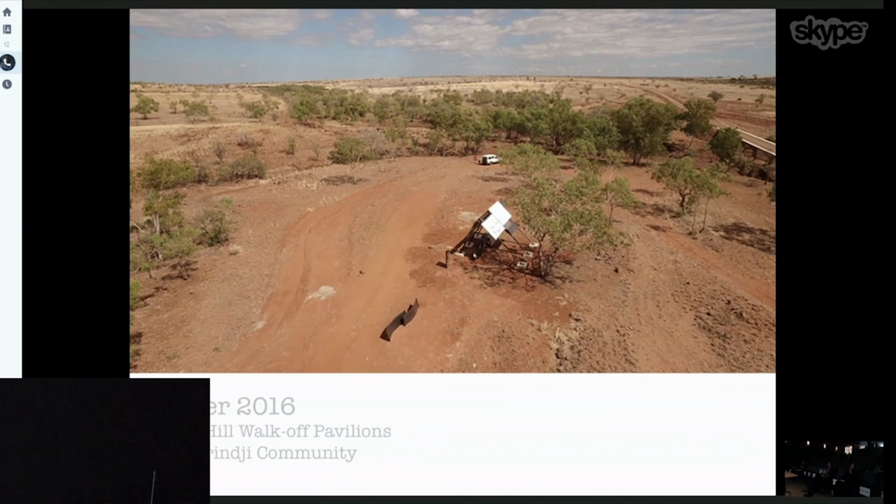But the process that we're working through is to do a series of entree, smaller projects before we get to the larger project. And that means that we're building the relationship with communities and checking out the capacities in communities and making sure that the design actually reflects the aspirations of the communities. So we're going to spend about 3 to 4 years doing these smaller projects before we commit to the design for the larger multi-million-dollar projects.